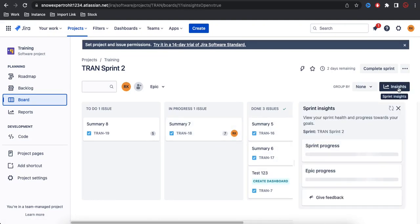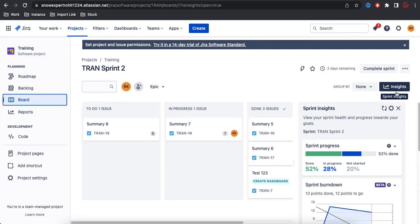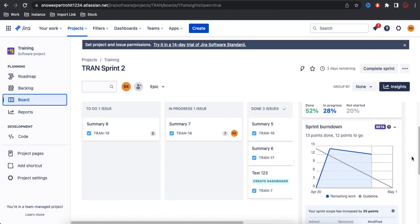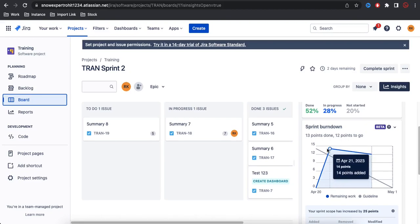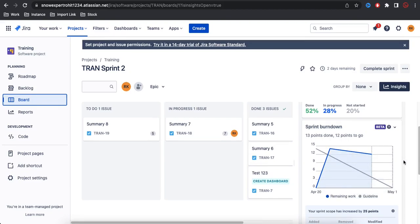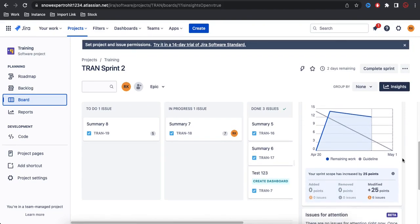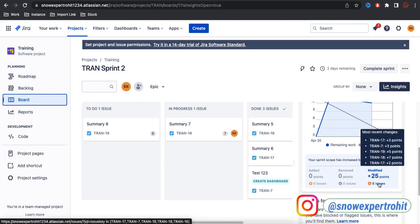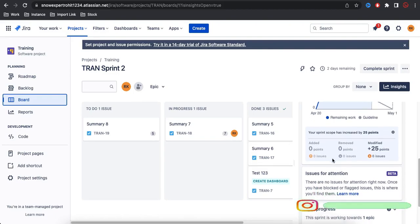If you click Insight, you will get a complete insight about this sprint. At that moment, it is saying that 52% is Done, 28% is In Progress, and 20% is Not Yet Started — which means the To Do list. Under this, you can see the sprint burndown chart showing when points were removed, added, and guideline details. It also shows the remaining tasks and total issues and points.